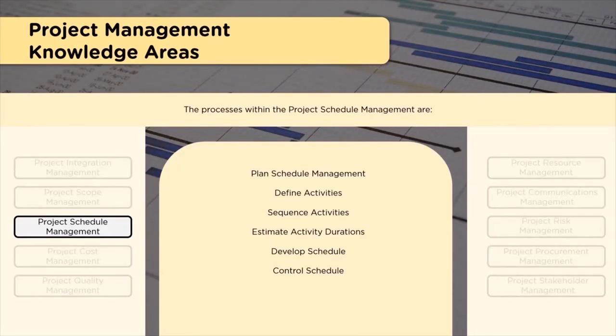Now, how many resources do I have? I may have around 25 resources. Now 1000 divided by 25, it will be around, I guess, 400 man days. No, I think 1000 divided by 25 is about 40. So 40 days will become the duration, whereas effort is 1000 man days.